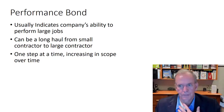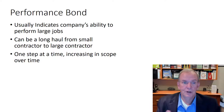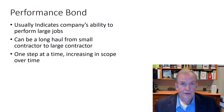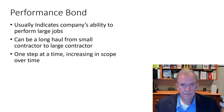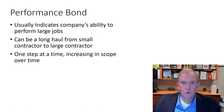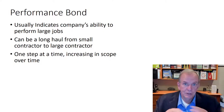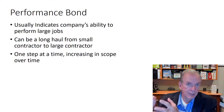To get somebody else to come in partway on a project nobody's coming in at the cheapest price — they're concerned about what was done prior and how they're going to join up to it. So it's not going to be the same pricing as it was originally. If the new bids are that much more, the owner would still likely only end up paying the original billion dollars as long as the bonding amount covers the overage.